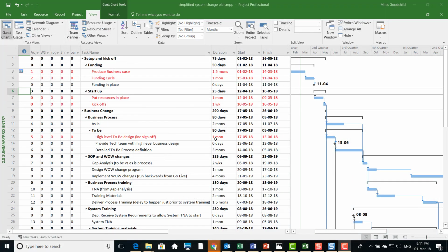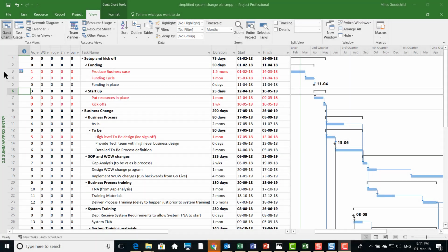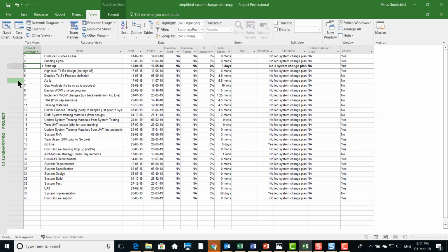In this example, we use a Microsoft Project file. With all plans, it is necessary to assign reference numbers from 1 to 200 for each of the items that you want to display in the summary. Note that when driving multiple reports from the same plan, you will need different sets of numbers. As this is Microsoft Project, we use a customized view which applies a filter to only show the items with the relevant reference number and displays the required information for each row.